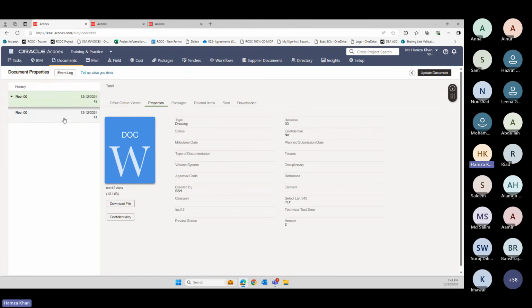This is the difference. I hope even this part is clear for you now, that any changes on your document will add to the version number. This version number will again increment once you transmit via workflow. Once the workflow is ended and it comes back to you, again the version number will change.